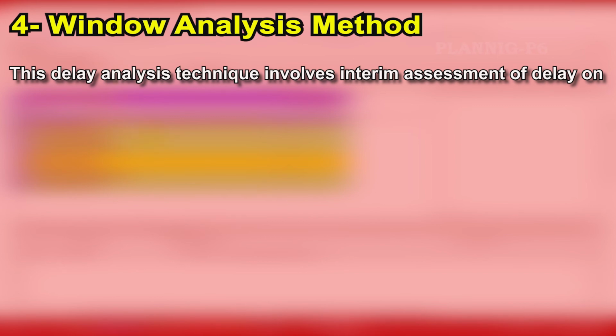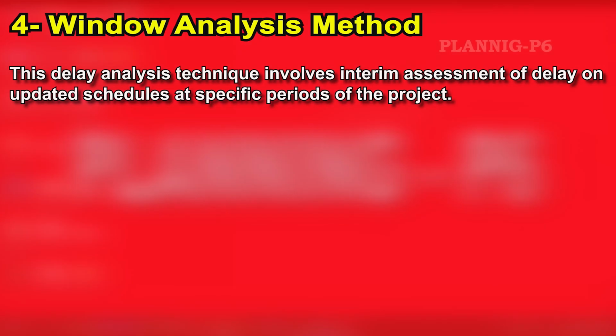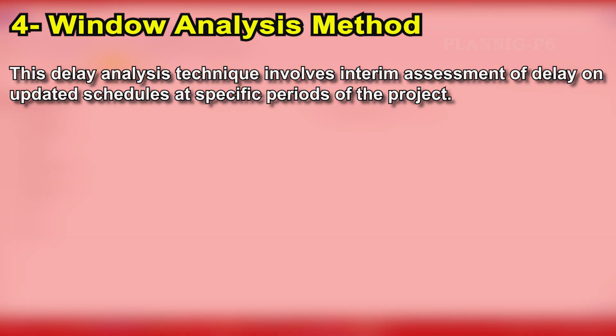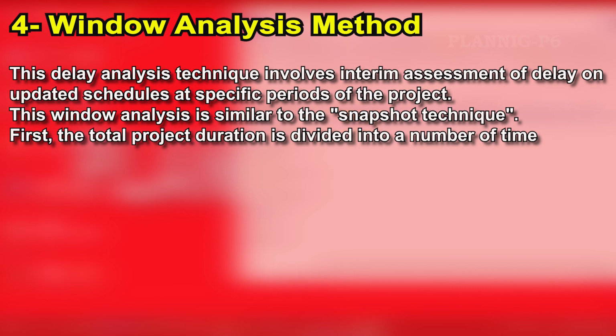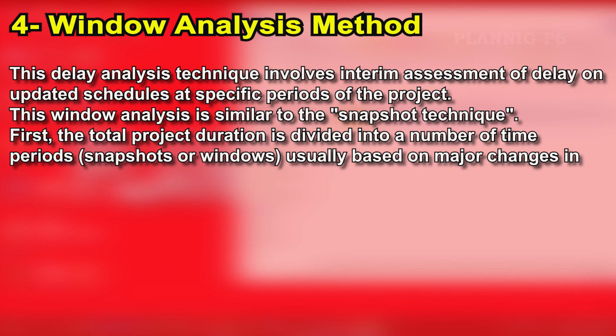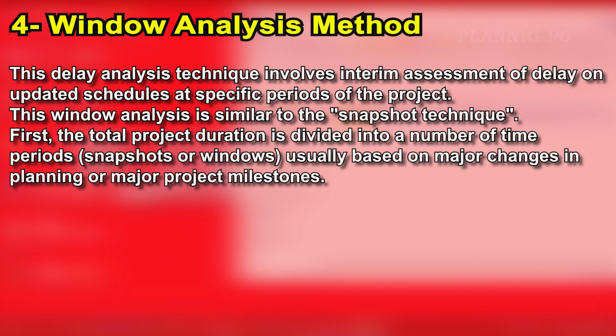Number 4, windows analysis. This delay analysis technique involves interim assessment of the delay on updated schedules at specific periods of the project. This window analysis is similar to the snapshot technique. First, the total project duration is divided into a number of time periods, snapshots, or windows, usually based on major changes in planning or major project milestones.